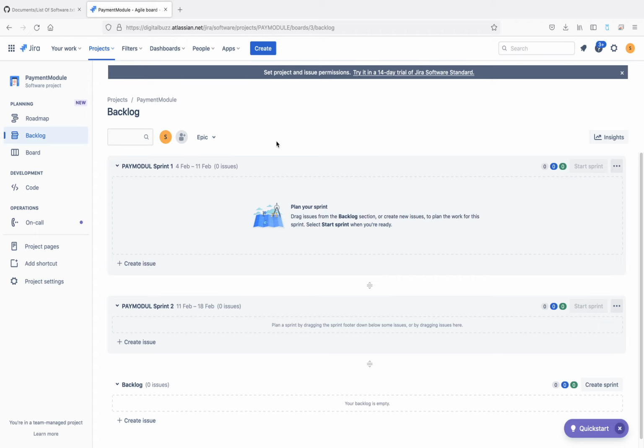For example, if you are working on this complete app, registration and login functionality should be developed at the very beginning. Otherwise all functionality will be impacted and you will not have proper testing. So you can put the registration module in sprint 1. Then next you will have profile management, which will be part of sprint 2.